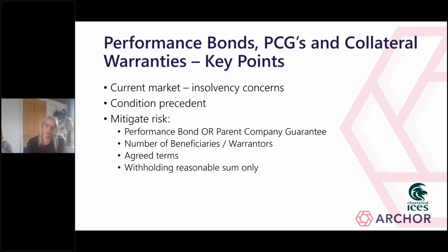Probably the most obvious point is that wherever possible, the condition precedent to payment should be reduced to an entitlement on the client to withhold a reasonable sum rather than full withholding of payment.